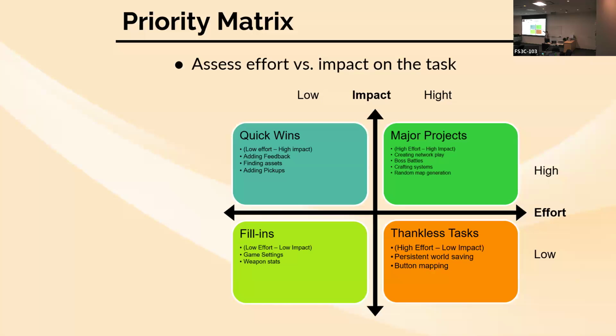So this is another high priority quadrant, but it's actually a little less priority than the quick wins in some cases, right? Because you're going to want to take from both of these, but quick wins are things that are going to be just as impactful with a lot less work. So those are things that you can put a little bit higher on your priority list most of the time.